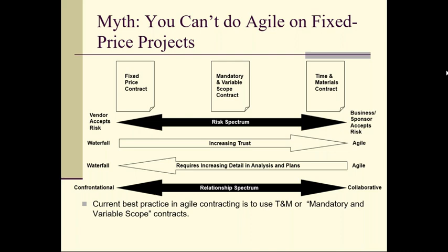And it's a trade-off. In government, because we use the zero-based budgeting model, everybody has to use up all their money by the end of the year. They don't want projects coming in late in the year over budget, because they've got nowhere to cover for that. They may not have enough contingencies or slush money tucked away in other places of their budget that they can borrow from. So it causes chaos, right? So they'd rather have the guarantee.